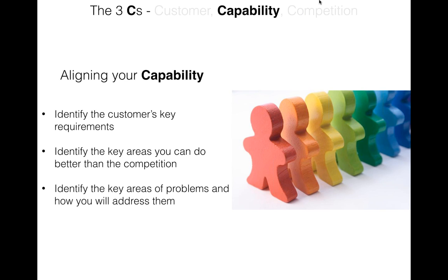It can be an internal reorganization of your entire way of doing things also, in which the customer requires that a particular functionality or a particular module or a feature has to be delivered within a specific time, or within a very short time cycle, but the later stretch of the project can be at a longer stage. So you may have to change your resource deployment or your way of doing. Instead of making it a flat resource deployment, you can make it top heavy and then stretched out resource loading in that requirement. So there can be different areas, and you need to identify which are the key areas of problems and how you will address them.